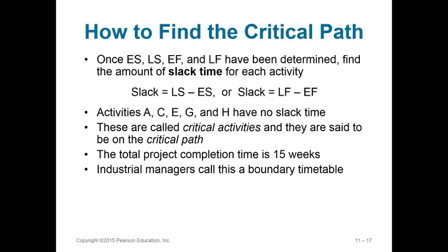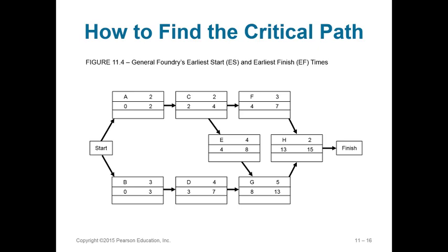If there's slack, it's going to be slack because you have the ability to start a project a little bit later and therefore end that project a little bit later, because there's some room. Take a look here, just looking at the first 2 activities, not looking at what the actual critical path is. First 2 activities would appear that it takes you 4 weeks to get activities A and C completed. It takes you 7 weeks to get B and D completed.